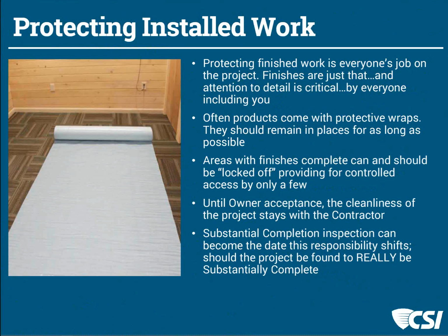And then when substantial completion occurs and we do an inspection, then it becomes the responsibility of the owner and not the contractor. So when we do a substantial completion inspection and we turn that work over to the owner, we need to be sure that it really is substantially complete, that it's clean and it's ready for the owner to use for its intended purpose. And then the owner may take steps to protect some finishes as well.